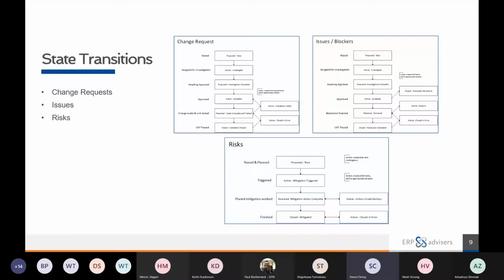So what I mean by state transitions is the preset flow that a work item takes, and it dictates how it gets from proposed to closed. And with CMMI, that's fairly prescriptive, and you can't change it, and it's not necessarily very intuitive. And therefore, it's one of the areas where if you're going to use this with a team, you need to make sure that they understand the process that you want to follow for each of these work items, and that it's used consistently. So that's transitions.